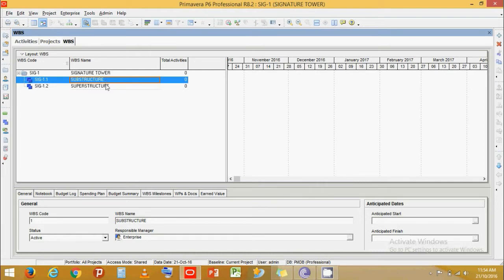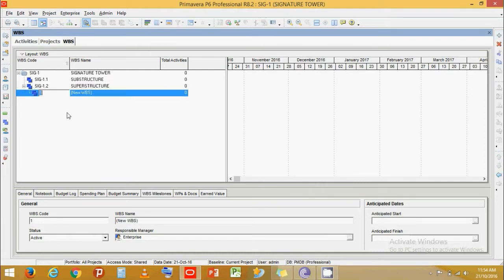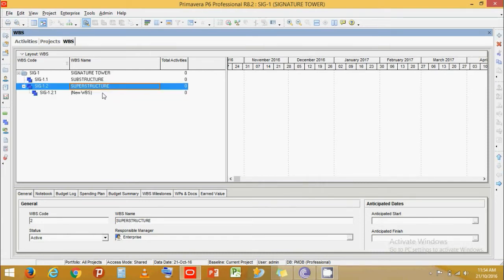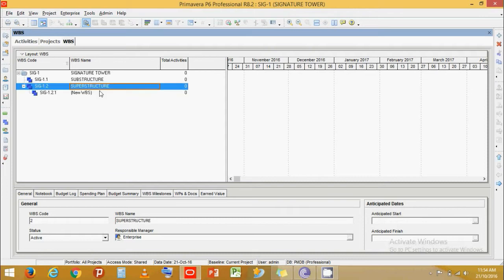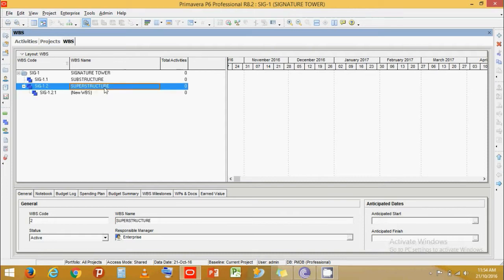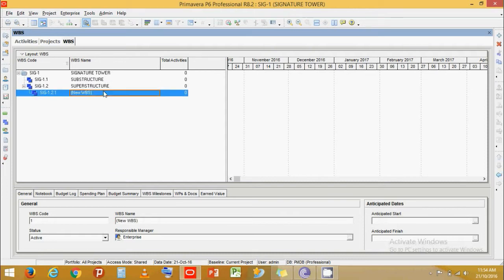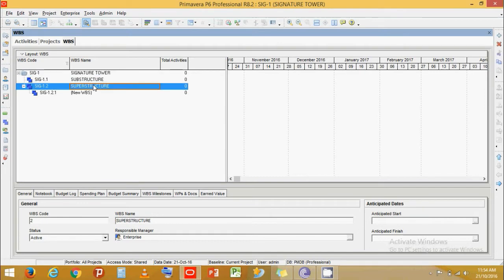If you click at a band and press Add, the next WBS will indent itself under that level. That is why it's really important to select the WBS band you want and decide under which level you want it — whether at the high level or the secondary level.